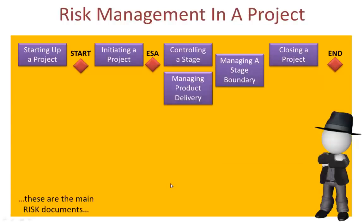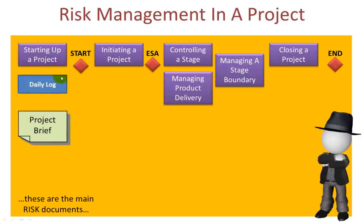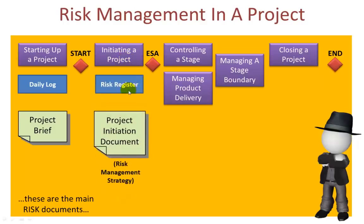Let's look at the main points within a typical project using the PRINCE2 processes where risks will need to be managed. Pre-project, when using the Starting a Project process, we have the daily log — it's here that we capture any risks and record appropriate actions. The project brief and the initiation stage plan, including risks in carrying out the initiation stage, form the basis for the project board's decision whether to proceed to Initiating a Project. In the Initiating a Project process, the risk register is set up and any risks needing formal management that already sit in the daily log will be transferred to it, and the risk register will be used throughout the remainder of the project.